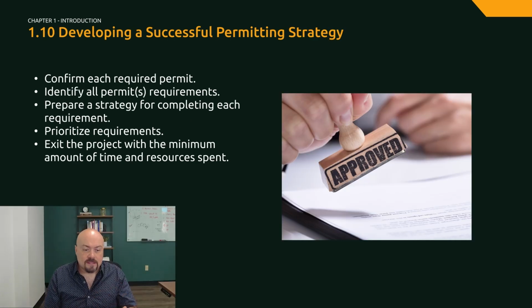To develop a successful permitting strategy for your project, you want to confirm each required permit and identify all permit requirements as early as possible to avoid redoing the work. This is really the first step in developing a successful permitting strategy.